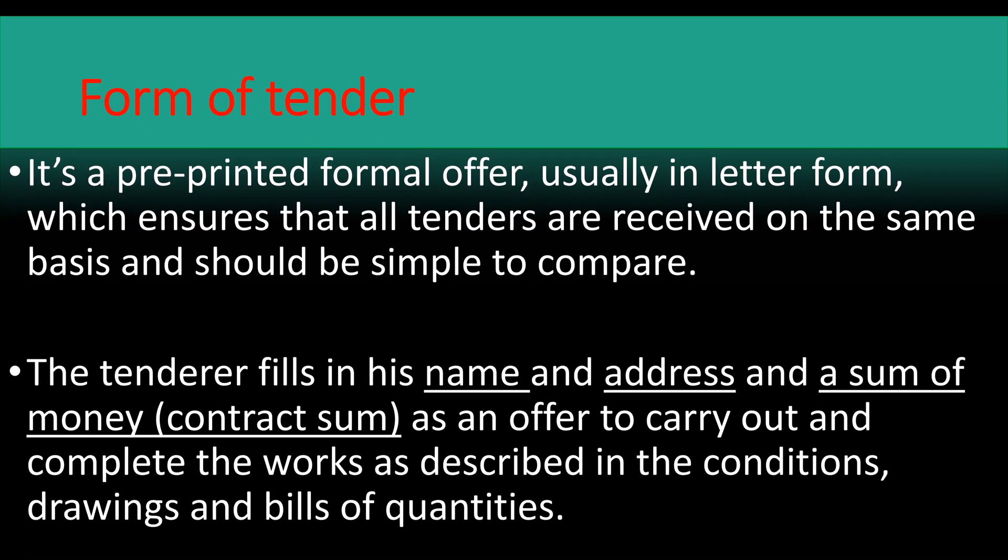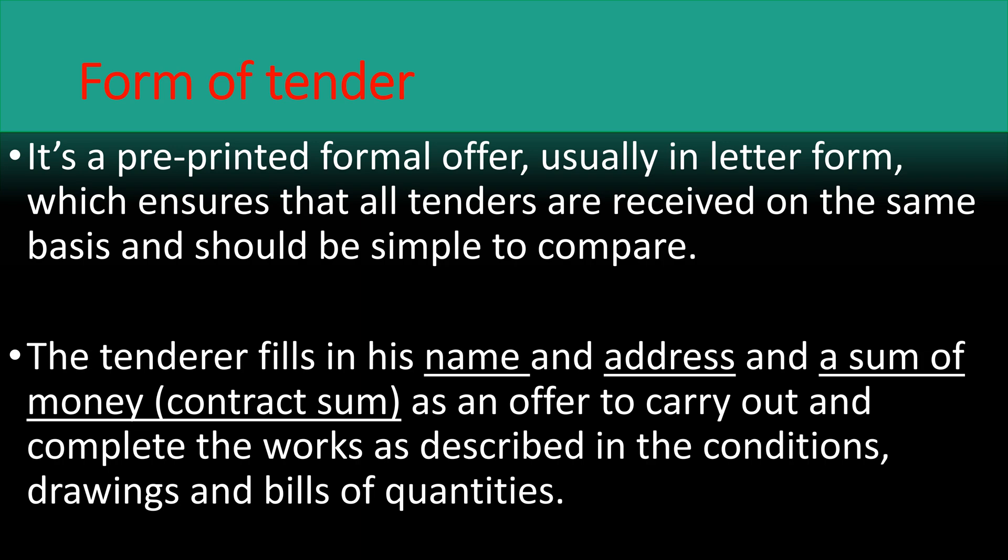The fourth document is the form of tender. It is a pre-printed formal offer, usually in a letter form, which ensures that all tenders are received on the same basis and should be simple to compare. The tenderer fills in his name and address and the sum of money — that is the contract sum — as an offer to carry out and complete the works as described in the conditions, drawings, and bill of quantities. All tenderers are required to fill the form of tender. It's like an offer he's giving to the client that he's ready to take up the work.